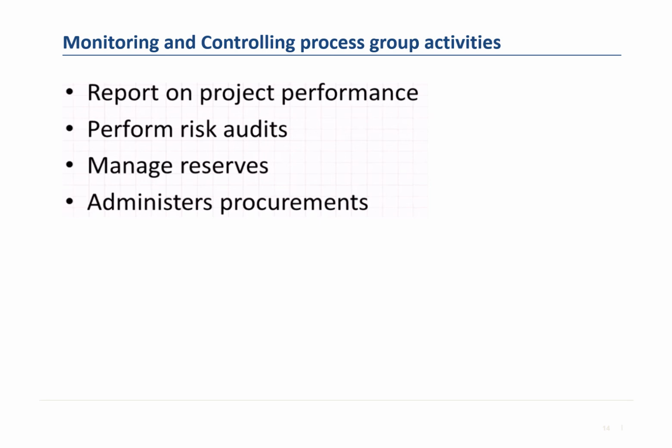Also, you perform risk audits. It could be done internally by some team members, or it can be done by people outside the team. So you go through the risk register, ensure that these risks are being looked into, and then come up with the risk responses.